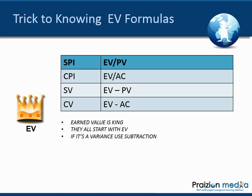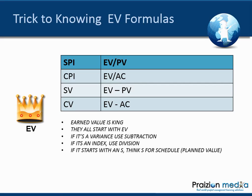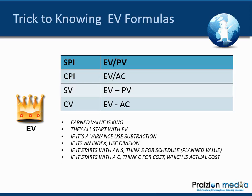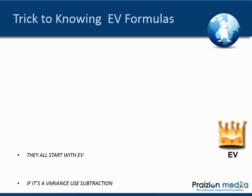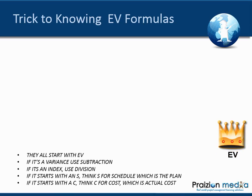Here's the trick to remembering these formulas: they all start with EV — Earned Value. If it's a variance, use subtraction. If it's an index, use division. If it starts with S, think S for schedule, which means planned value — the schedule is the plan. If it starts with C, like Cost Performance Index or Cost Variance, think C for cost, which is actual cost.